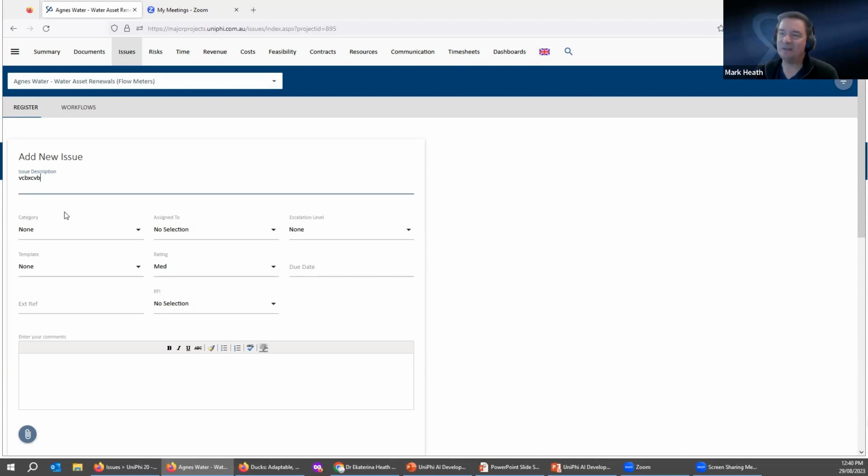What we see is issues having 2 or 3 or 4 conversations back and forth to clarify. An RFI might be raised, and the first response is, can you clarify? Then an RFI gets closed out and another one comes in sometimes. But if you append it to the existing RFI, at least you get the history. This conversation goes back and forth for maybe 2 or 3 days before you actually start to try and solve the problem, because the communication hasn't been that great.